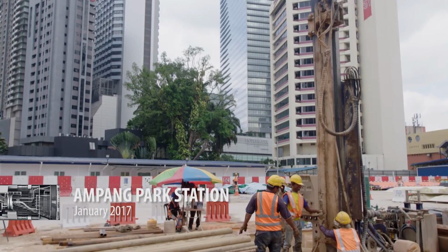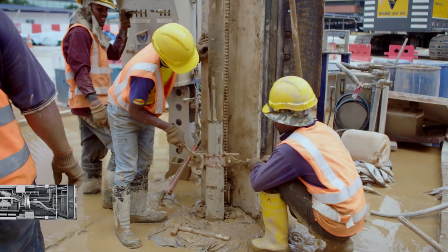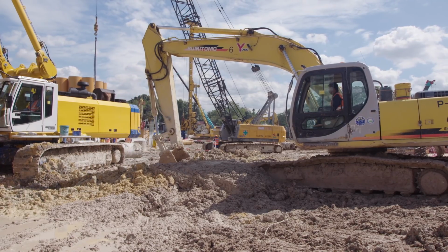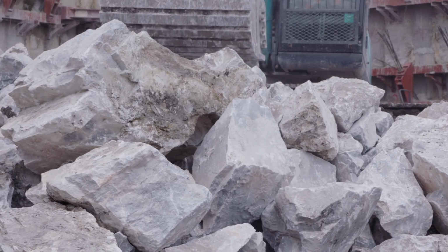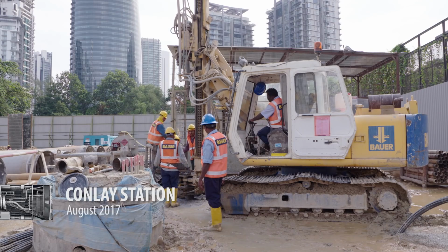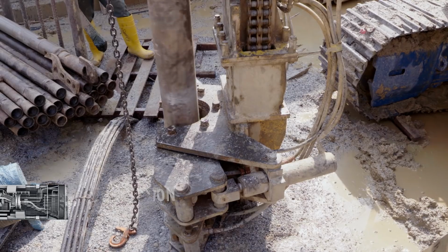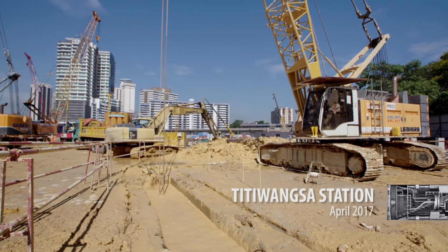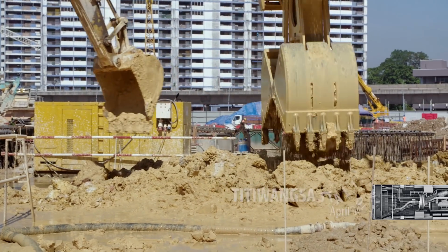At every site, soil investigations were carried out to determine the ground conditions. The SSP line will traverse through three types of ground conditions: the Kenny Hill, the Karstic limestone and mixed granite. Ground treatment works were carried out to ensure that the ground is stable and will not collapse during construction. Each station or shaft has its own retaining walls designed based on the ground conditions.